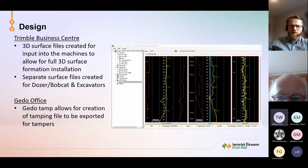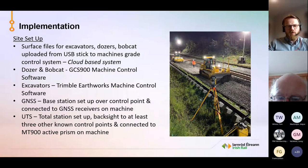So then to talk site setup, in terms of how this actually works on the ground once we have our designs and our files created. So the surface files for the excavators, dozers and bobcats are uploaded from a USB stick to the machine's grade control system. We're currently trying to